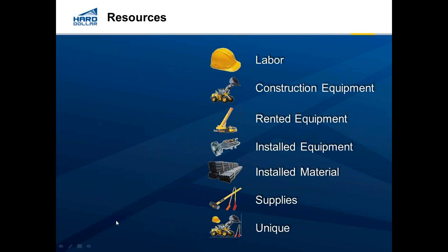You want to make sure that you have defined already in advance what the resources are that we typically use. In other words, if you're looking at labor, what are the types of labor that we use? What operators? Maybe you have an operator class 1, 2, 3, something like that. You have laborers, you have the foremen, you have carpenters, iron workers, whatever kind of work you're doing. You want to go ahead and classify all those.